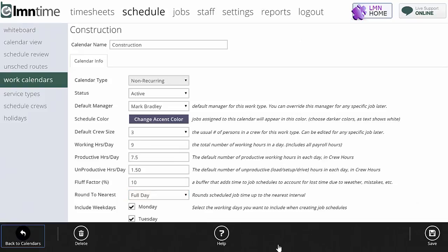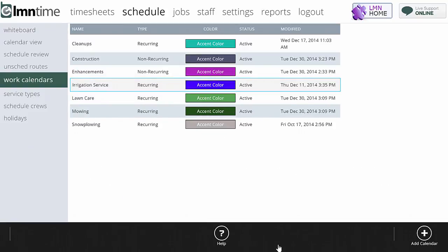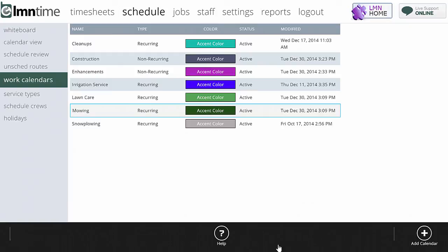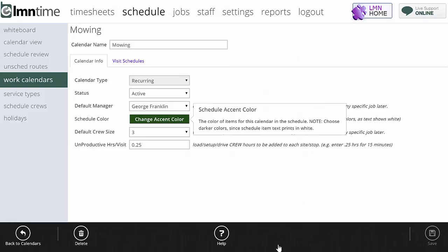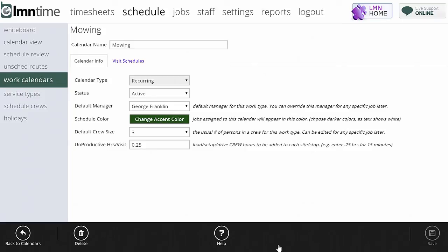Now let's look at a recurring calendar. There are two types: regular recurring like mowing, and irregular recurring like lawn care where you go a couple of times, miss a few weeks, then go back again. For mowing, the settings are much simpler — you've got active status, a default manager, your color, default crew size, and default unproductive hours per visit. If you estimate drive time and setup time into your jobs you don't need to add unproductive time to your schedule; if you don't factor in drive time or AM prep time, you need to add some unproductive time.